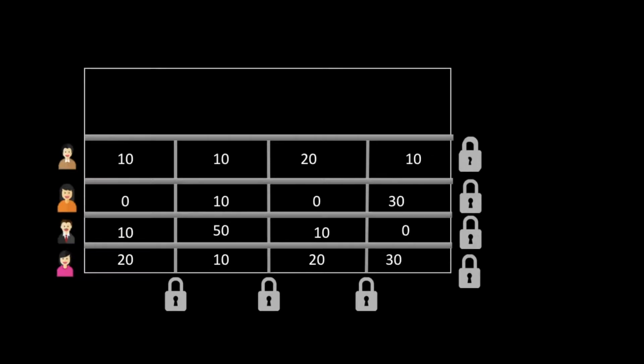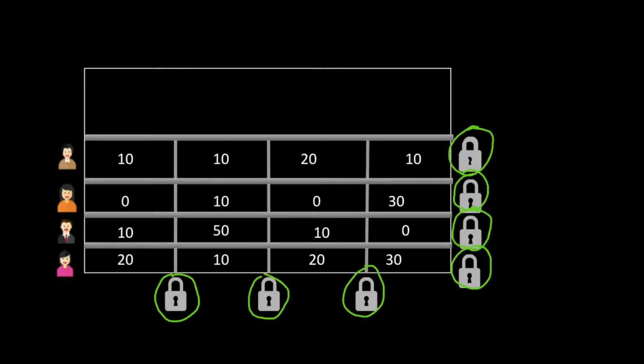First, let's take a look at the way that traditional budgeting works. First of all, often before we know what money is going to be spent on, money is allocated to budget holders, a bit like shown in this diagram. This is rather like taking a big bet on a horse race before we've seen the horses. Then these resources are locked in place. They're not only locked in place by virtue of being allocated to budget holders, but very often they're locked in place in time as well. And this reduces flexibility.